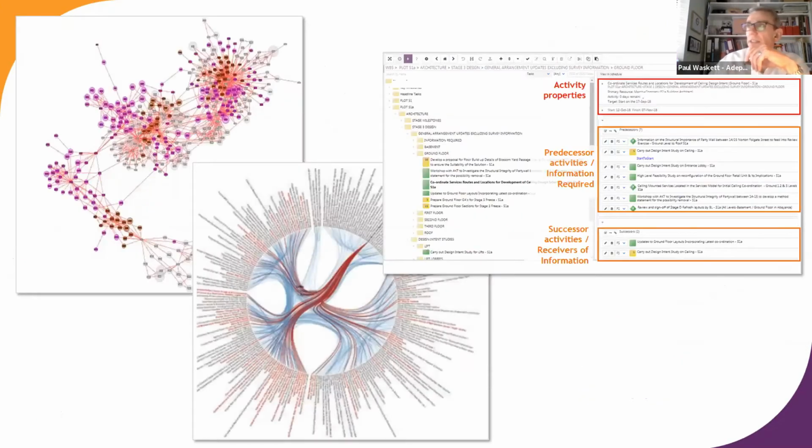So the first method is process modeling. Flow makes use of process modeling or process mapping. And here on screen, you can see a process map, a relationship diagram, which is that rather funky looking spirograph style diagram that flags up where really key relationships are between activities, and a work breakdown structure and a relationship mapping, which you can see on the right hand side there. So we define the process in the form of these process models and process maps.